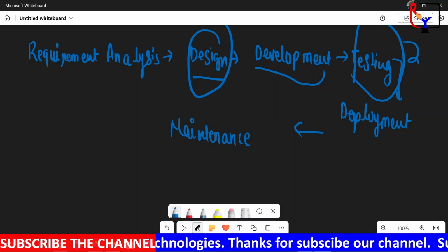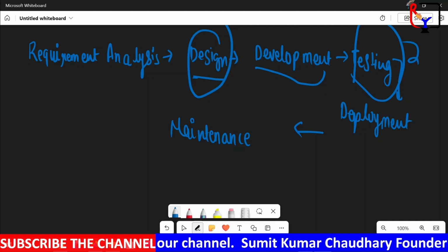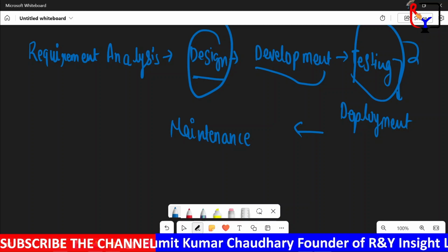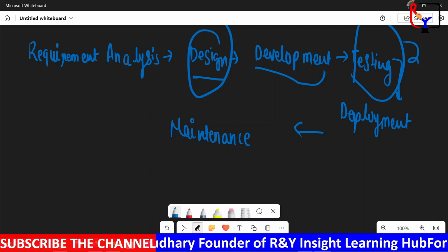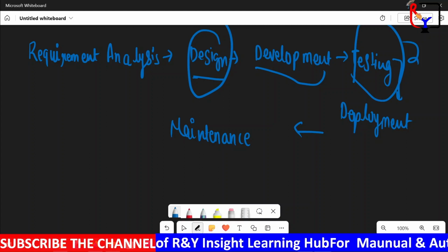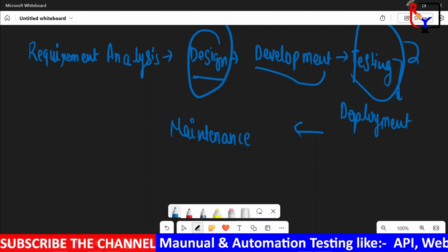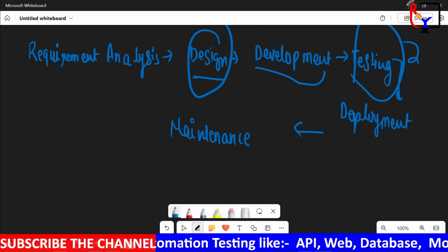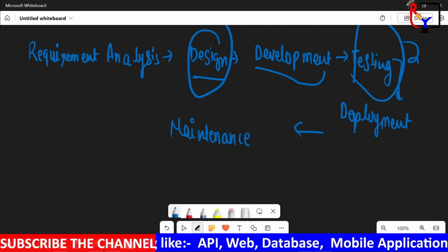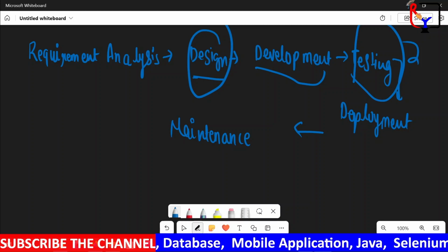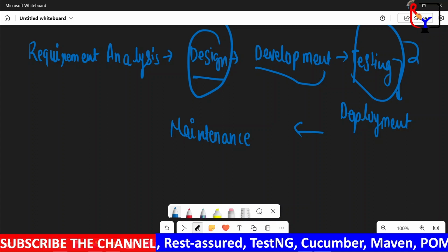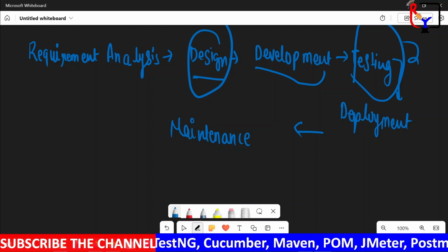As a result, adjusting is difficult and expensive. Regardless of when errors are found, they cannot be fixed until the maintenance stage. This lack of flexibility makes this model costly and more time consuming than other models. If requirements are unclear or misunderstood, this model is very risky. Additionally, the waterfall model is not ideal for a long, complex, or ongoing project where more flexibility is required.